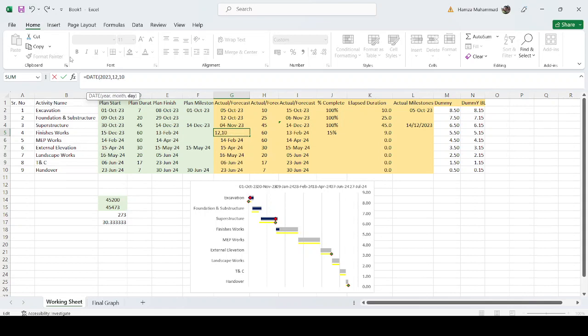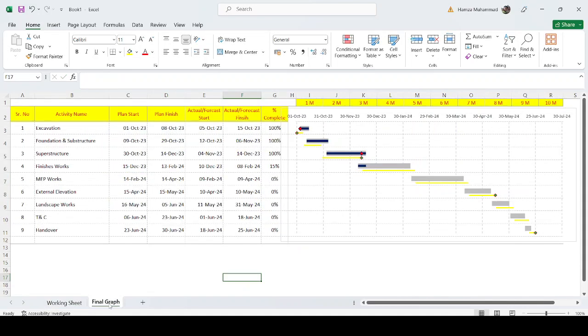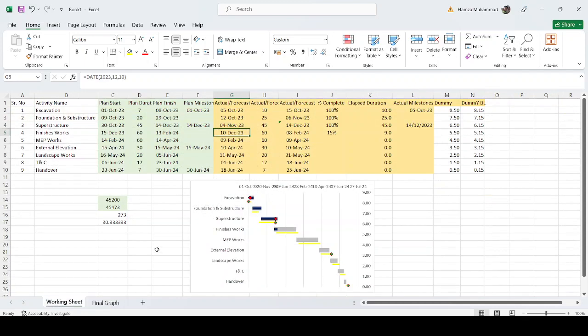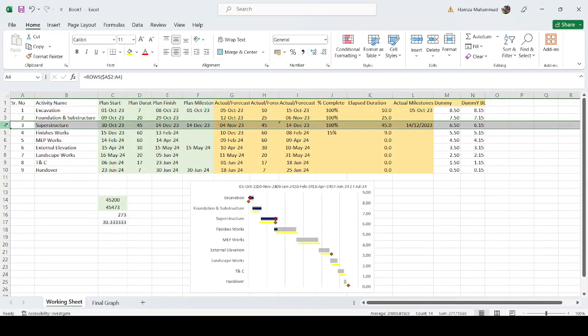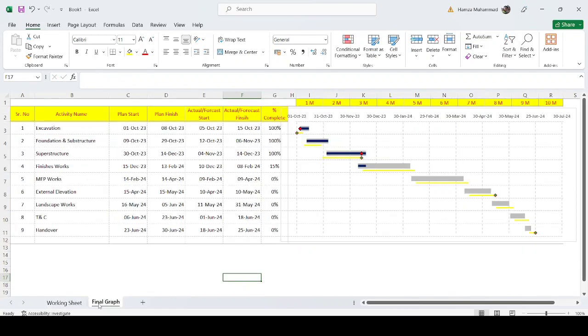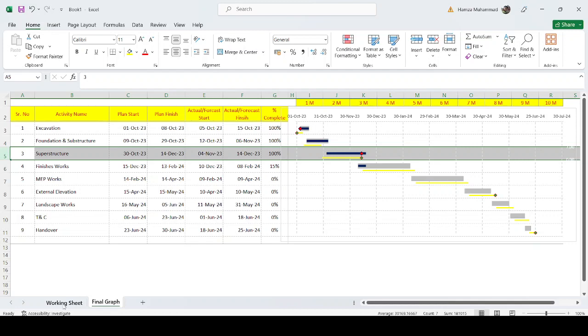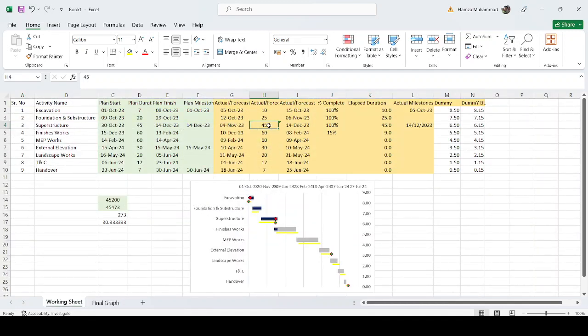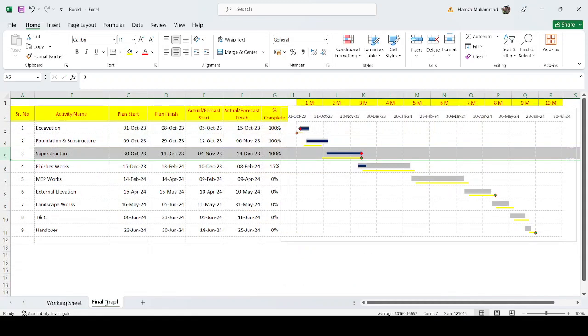December 10. Okay, so we see here, see this open here, but now the completion date is 14 December, and this plan milestone date is, you may notice that the duration for the structure work is more. This is because we typed the value here manually. So now, because our task is completed, we put the formula completion minus start, Control Enter. That's 40 days. Now it's okay.